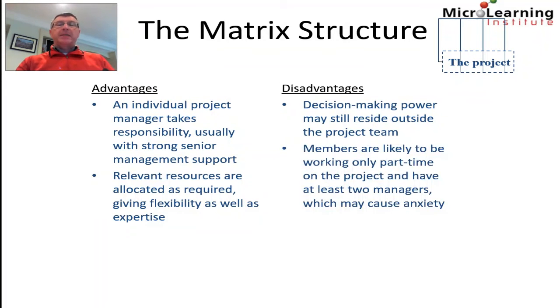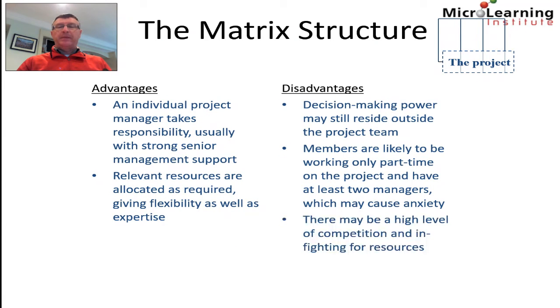Again, another disadvantage is that members are likely to be working only part-time in the project and to have at least two managers, one of which will be the project manager, another of which will be their functional manager, and this may cause them anxiety, particularly at times of peak load on project work or maybe peak load in the work in their own individual department. Finally, there may be a high level of competition and infighting for resources because the project manager and the functional managers are now going to be looking to get the best resources allocated to the work that they want to get done, which might of course not be in the best interest of the organisation overall.